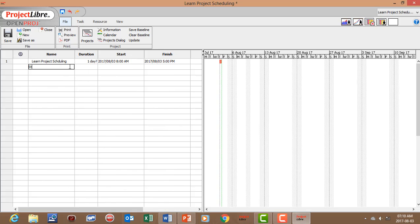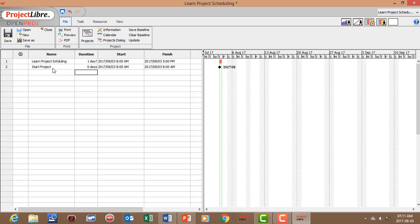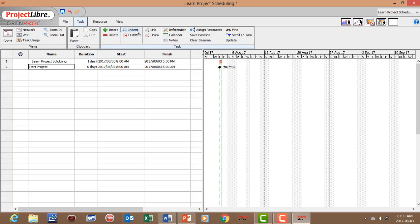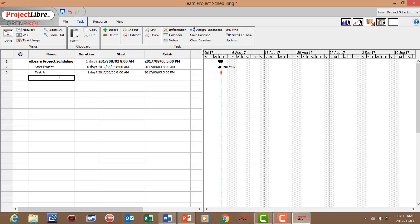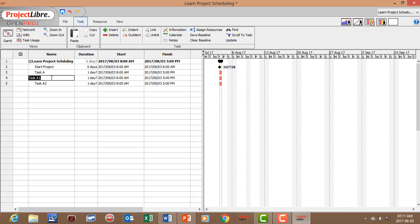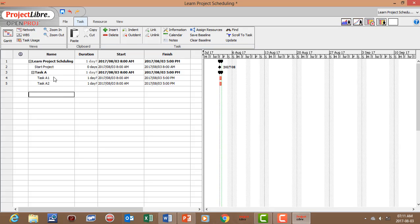We're going to start off with a milestone: 'Start Project'. To show a milestone on your Gantt, set the duration to zero. We can indent that — go to Task, then Indent. Then we add Task A as one of our main tasks, with sub-tasks Task A1 and Task A2, and indent those underneath Task A.